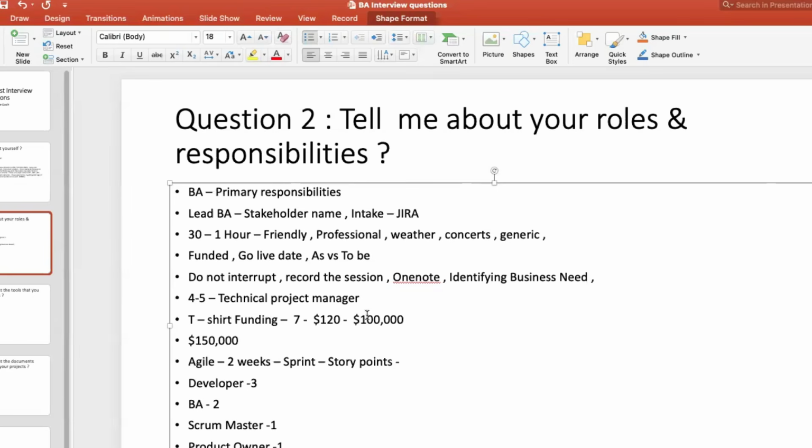So what he will do is he knows how many people will come under this project. So he's going to estimate per hour how much. He knows your salary, so apart from that, he will always bill 30-40% extra from your salary, because he has to showcase the profit also. So what is his core job as a manager? He will bill onsite, make sure your salary is taken from that project, and the remaining he will showcase as profit coming from your team. That is his core responsibility as a project manager.